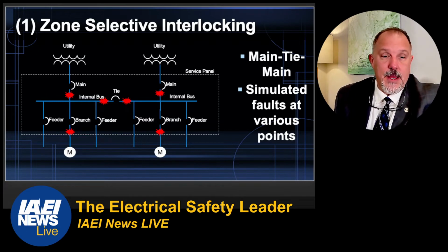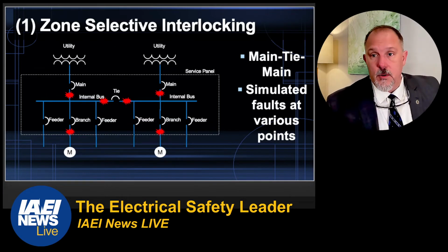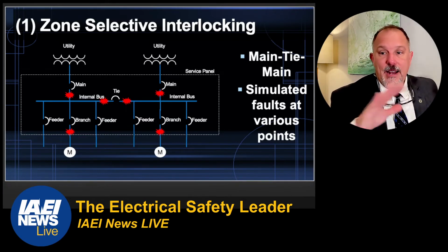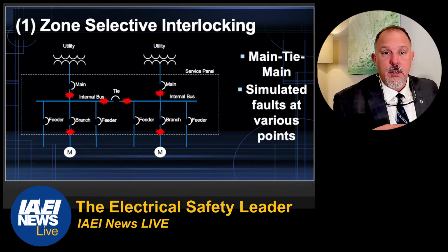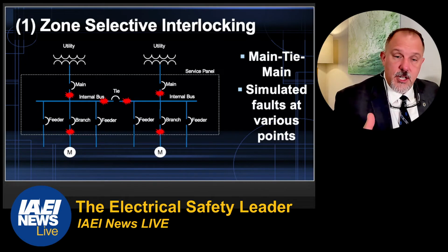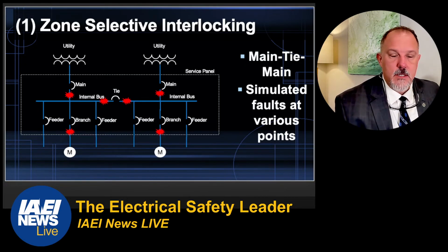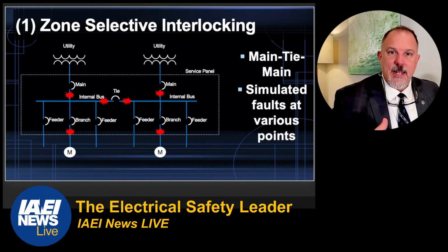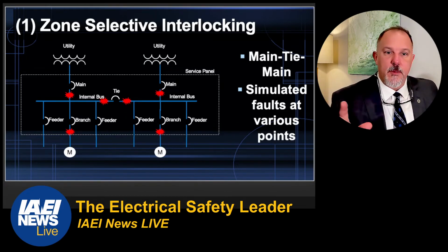And when you're doing that, you need to simulate faults at various locations in this power distribution equipment. You don't just test one set, because each of these circuit breakers has wires going back up to them. Think about it.